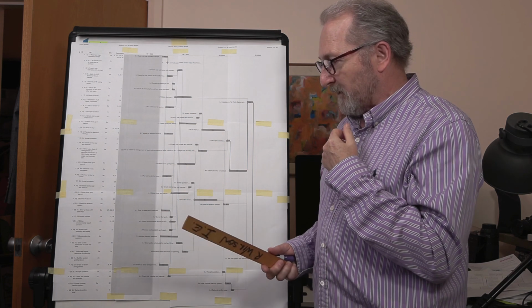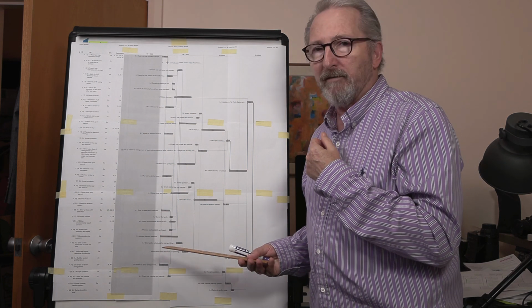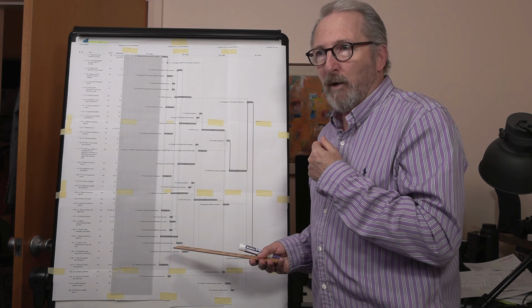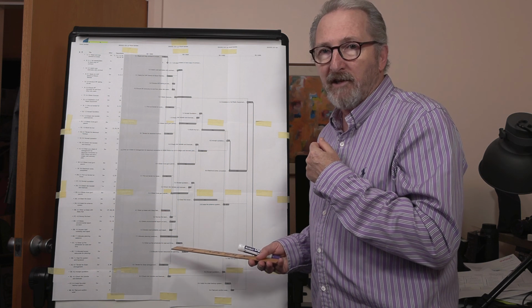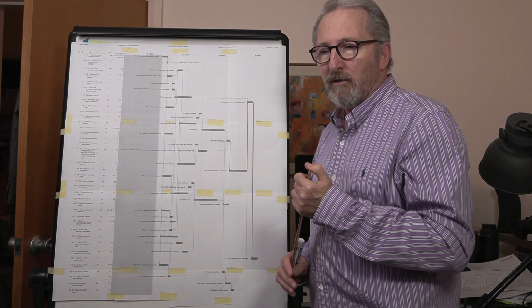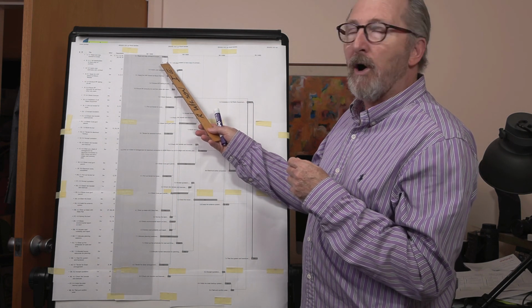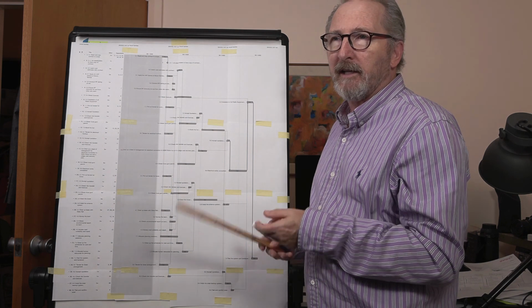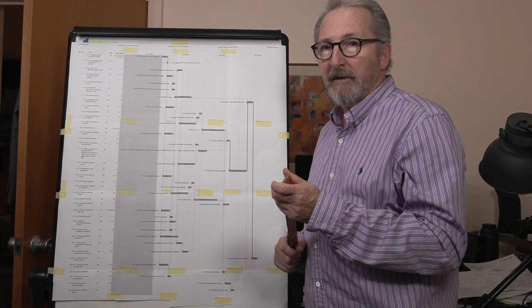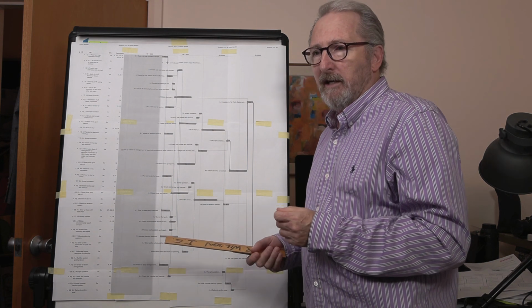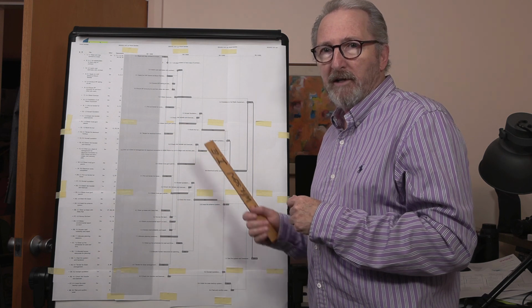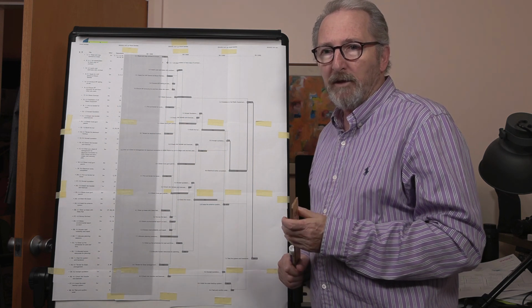A couple of other things that I saw, I had a couple of tasks that went nowhere. They didn't have any successor to go to. So in one case, I finished up putting a milestone next to it, and in the other case, I worked out that it did actually have a successor, and I was able to go back into the software and put that in with a connection.